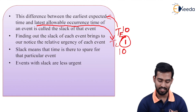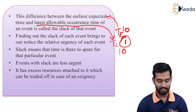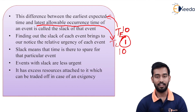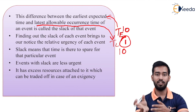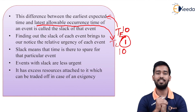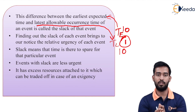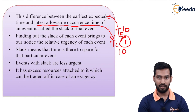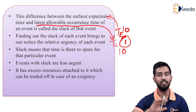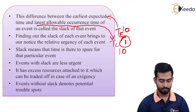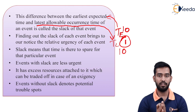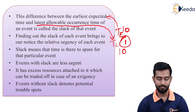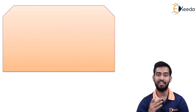Events with slack are less urgent — they have excess resources attached which can be traded off in case of any urgency. We can use those resources for other activities where the slack is zero and urgency is more, to complete those activities within the expected time. By finding out slack we can identify which activities can be delayed and which are allotted more resources, so those resources can be used for different activities. Events without slack denote potential trouble spots — we have to be very attentive to those activities and monitor them very precisely, otherwise the whole project will get delayed.